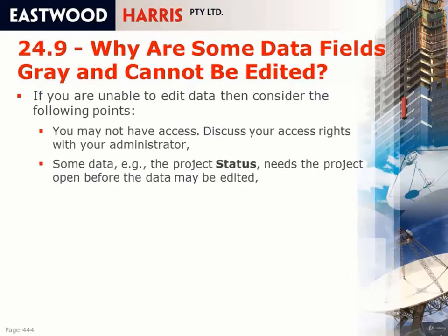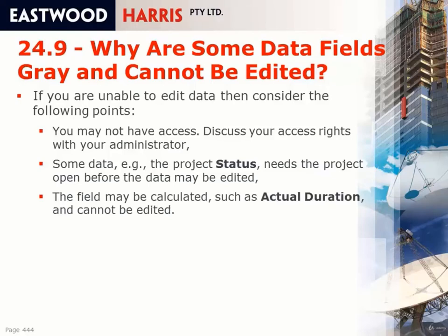You'll find that some data, like the project status, needs the project to be opened before the data may be edited. And finally, you find that some data is calculated, such as the actual duration, so you can't edit it.